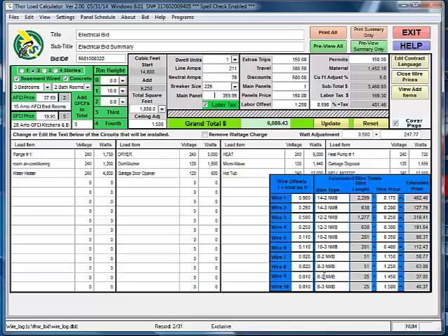And down here we have some complementary numbers. For instance, here we have 10%. It's only 1% of the house. So 1% of 1,800 square feet times 6-2 NMB at $1.45 a foot will give $37. If you don't use these at all, just make them 0, and they will be zeroed out on the price. And that's how you change the calculation methods.